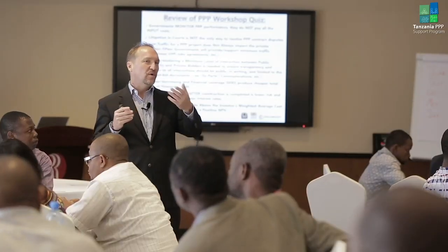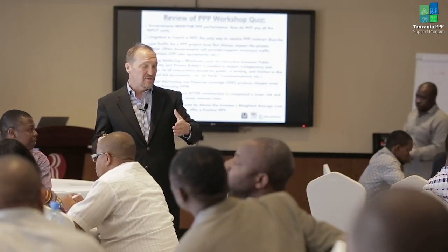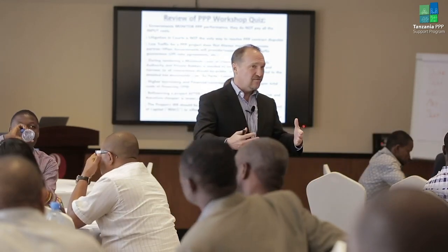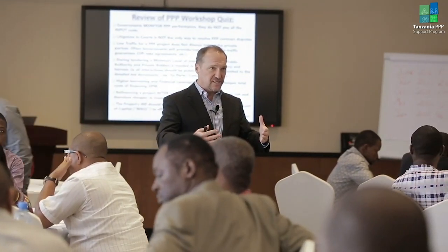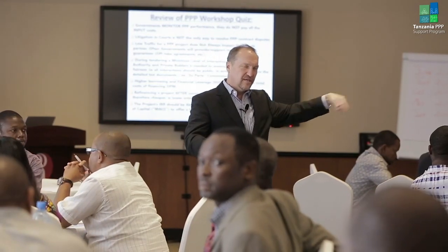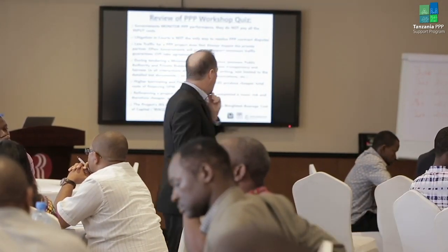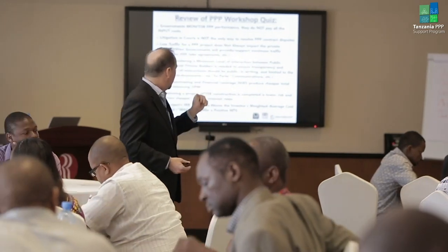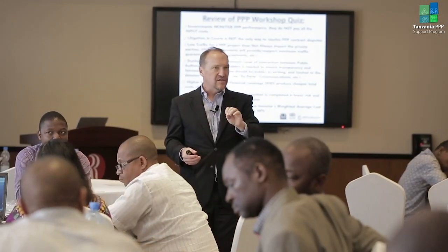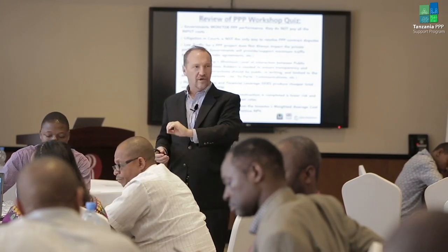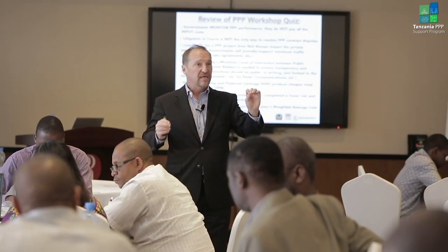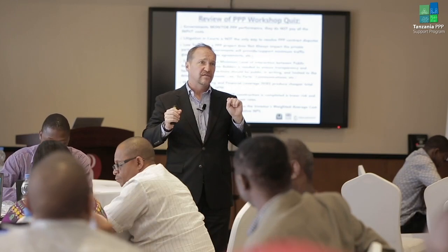In that case, what it means is if the lender is not repaid, they can take over the project if it's project financing, but they don't have recourse to other assets. And the reason that lenders will accept a lower interest rate compared to equity is that they take less risk.